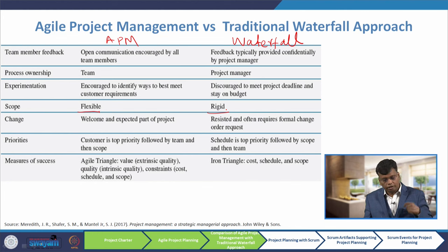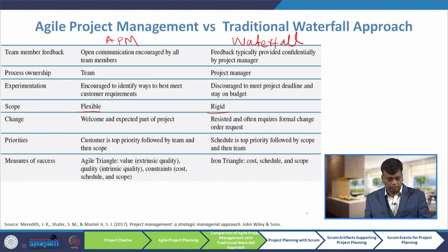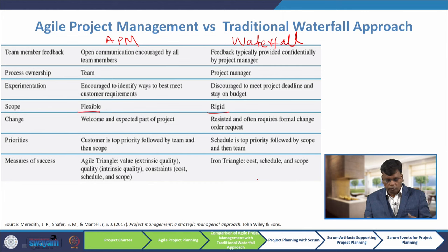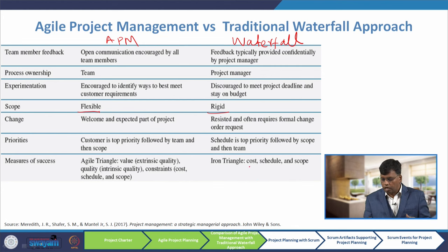With respect to scope: in agile it is flexible, but in waterfall the scope is frozen and rigid. With respect to change: in agile, change is welcomed and expected; in waterfall it is resisted and often requires a formal change order request. For priorities: in agile, the customer is top priority followed by team and then scope; in waterfall, schedule is top priority followed by scope and then team. For measure of success: agile uses the agile triangle — value (extrinsic quality), quality (intrinsic quality), and constraints like cost, schedule, and scope; waterfall uses the iron triangle of cost, schedule, and scope.